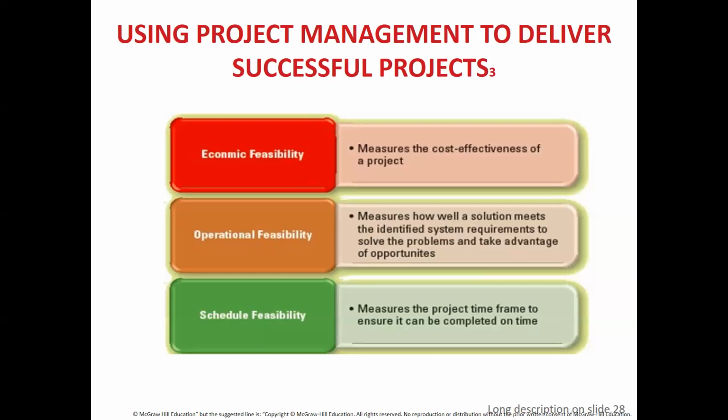Remember, this is estimate cost, 5 years time, and how much money are you going to make, and how much profit you're going to make, and on which year. For example, if you're saying within 5 years you should be able to cover up the cost, that means from 6th year onwards your project will be able to deliver your profit.